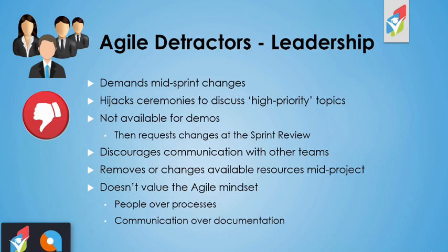They've already committed to those high priority items and what they feel they can get done in that sprint. Trying to make a mid-sprint change can cause rework and other issues that just don't need to be there. The team is being very adaptive, and let's say you have a 2-week sprint.